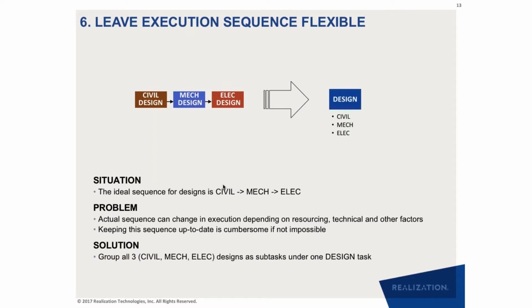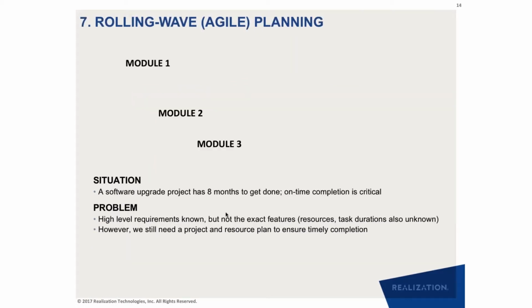Instead of scheduling them one at a time, what I want to think of it as is this multifunction task of one design, where all the design is being done at the same time. So as designs are happening, I still have each individual set of tasks or activities that have to be done by each one, but I'm doing the design all at one time instead of stretching it out.